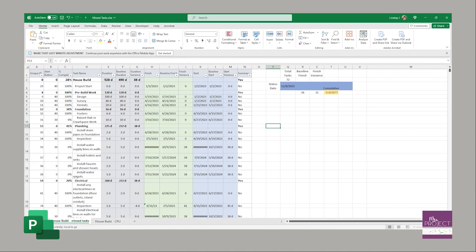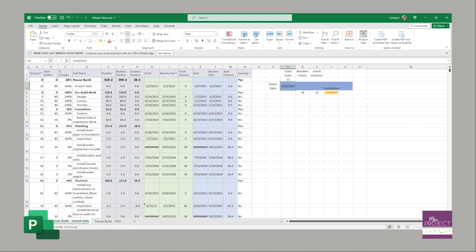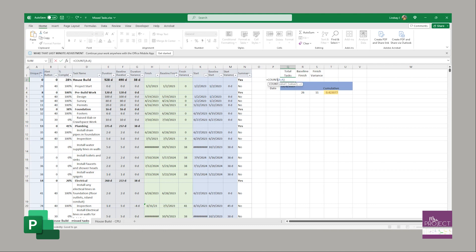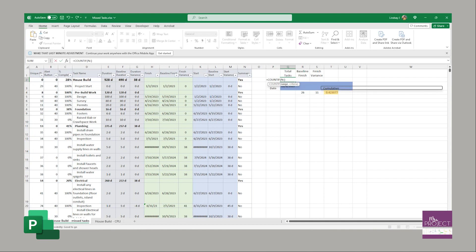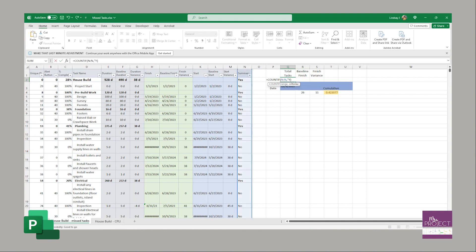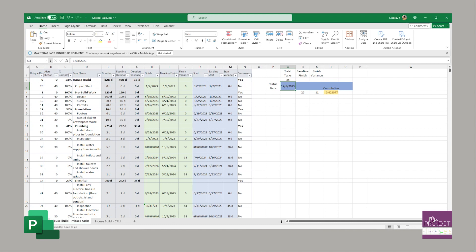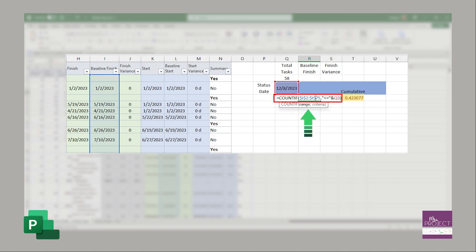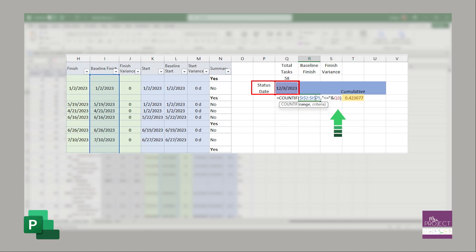I have a formula that says, okay, how many total tasks do we have? It just counts everything in column A. If it's populated, it counts it, which does count summary tasks. So we could do a COUNTIF on the summary column and say count if it's a no, because we don't want summaries. So we changed it - out of the 72, there's only 58 that are actual detailed tasks. We used our status date of 12/8. This helps Excel know what date you're tracking to. Then I do another COUNTIF formula on that baseline finish column and say if it is less than or equal to that status date, and that's where we got the 26 from.